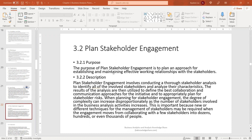When planning for stakeholder engagement, the degree of complexity can increase disproportionately as the number of stakeholders involved in the business analysis activities increases. New or different techniques for management of stakeholders may be required when the engagement moves from collaborating with a few stakeholders into dozens, hundreds, or even thousands of people. The complexity increases with the number of stakeholders.